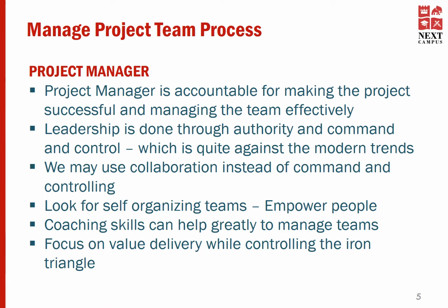Reward power stems from giving rewards. For example, you can say to a project team member, based on your performance, you will code the screen you want as next assignment. So you are rewarding him that if he performs well in his current activity, he will have the preference to select the screen he will code as next assignment.